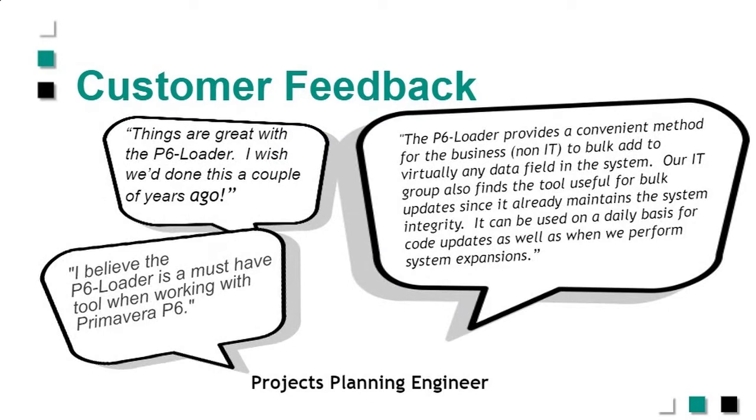A lot of people say, this is a tool you have to have if you're working with P6, particularly when you're working with large data sets, because it just lets you do things you couldn't otherwise do. We had one quite recently where we had to change all the resource assignments in an activity that had progress. Well, P6 won't let you change resource assignments if there's already progress on them. You have to remove the progress, then you can remove the resources. And we needed to remap all of the resources in a turnaround schedule of about 60,000 activities. So in this case, we could do that with P6-Loader.